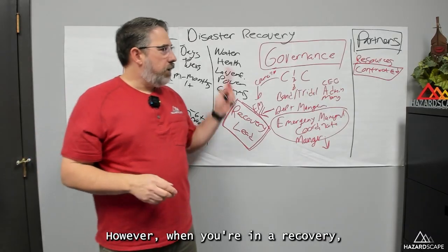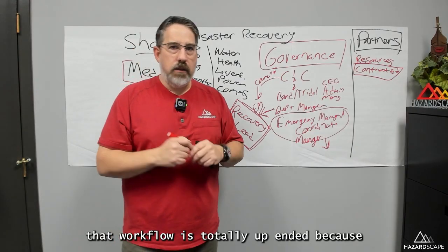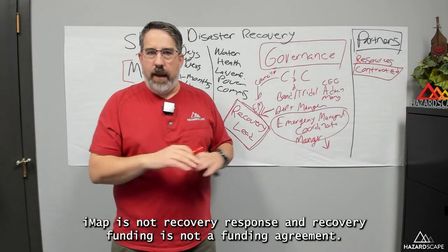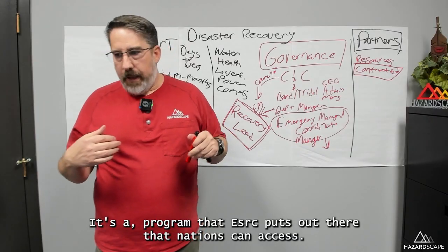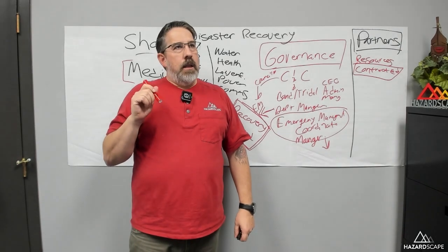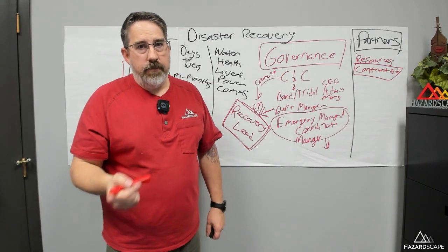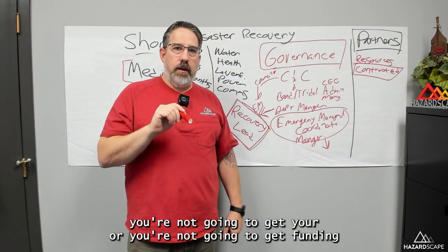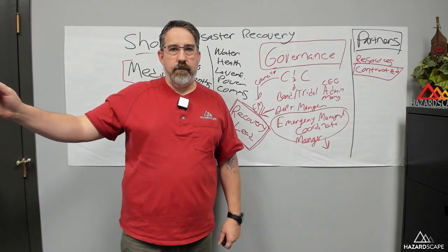However, when you're in a recovery, that workflow is totally upended because ISK through EMAP, because it's not a funding agreement, EMAP is not recovery, response and recovery funding is not a funding agreement. It's a program that ISK puts out there that nations can access. It works on reimbursement of actual costs. And what that means is you're not going to get funding to pay your contractors until ISK has seen the invoices.